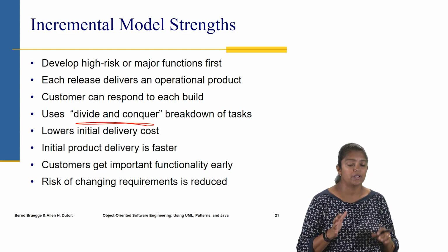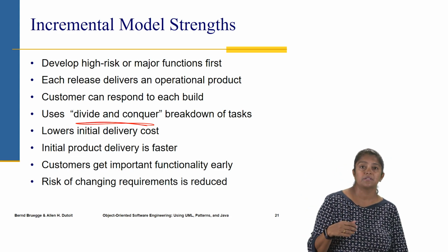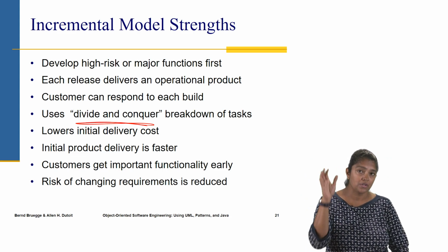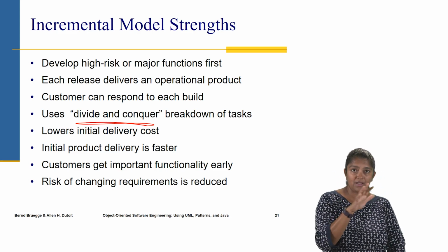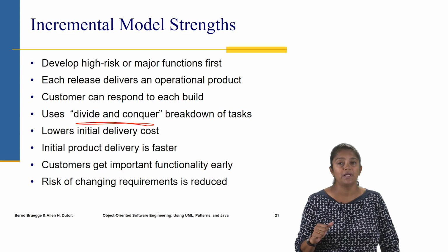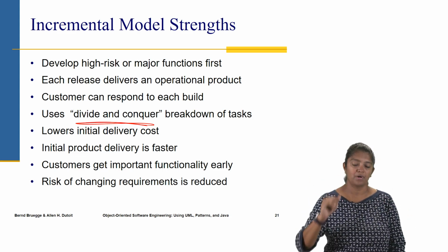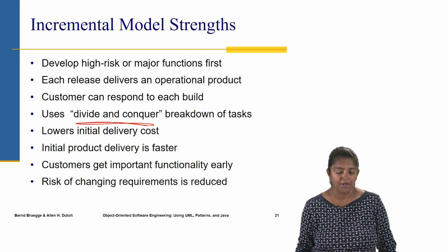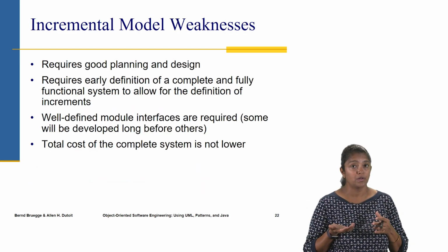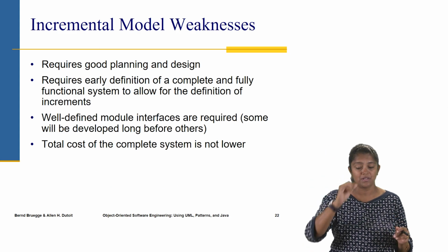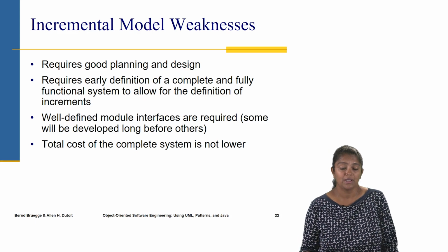The only thing though is that the first 3 steps are still done in a linear model. So until we get to a high level design phase, until that high level design is completed, we cannot get into the increments part. So at least that part should be clearly defined. So in terms of weaknesses, it requires good planning and design, because those first 3 steps are pretty much done in a linear fashion and there's no looking back on that.